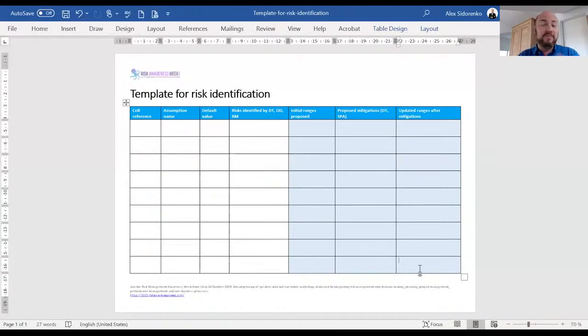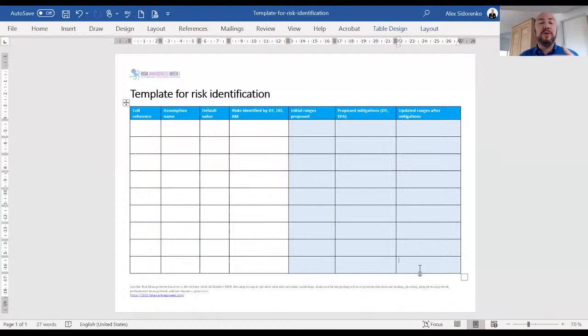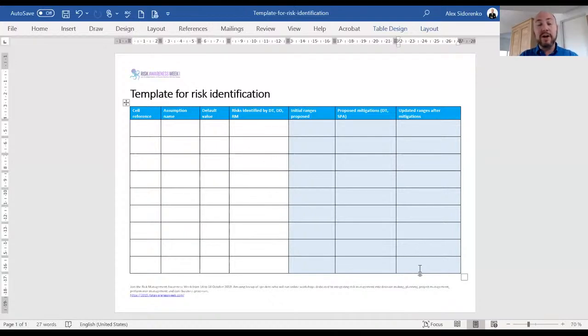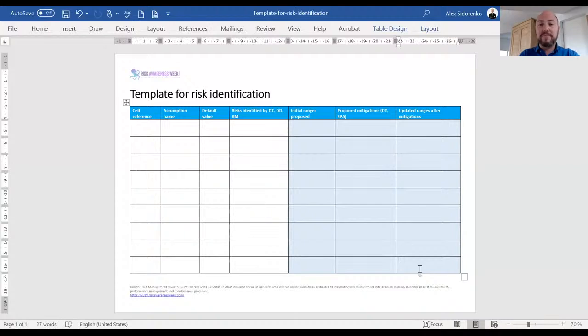We're saying we've tried to reduce this uncertainty as much as possible. This is how much uncertainty is left. It's probably impossible to reduce uncertainty to zero. So this is the kind of risks that you need to acknowledge and take in order to make this decision. Are you comfortable with that? If the decision makers are comfortable, then that's risk analysis done, then it moves into monitoring and implementation.